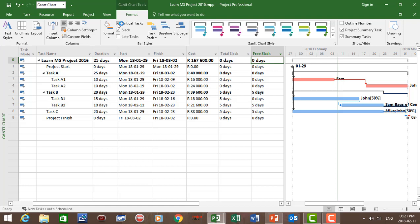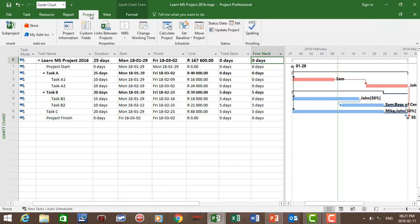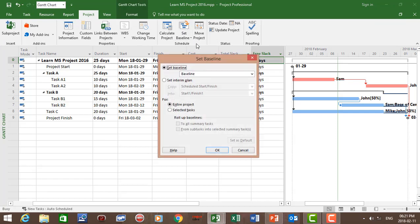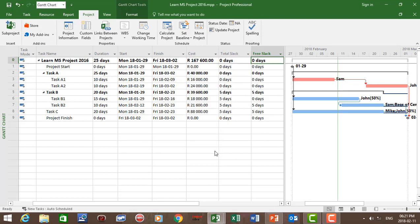Now let's save the project as a baseline. Click on Project, Set Baseline, and we're going to save it as a baseline for the entire project. Click OK and save the project.